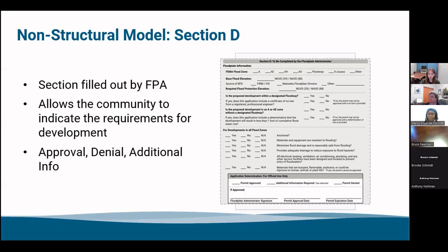There's also permit approved date and permit expiry date. This may be more for structural developments, but some developments would go on for a long time and that permit would have expired by now. Once that permit expires, they'll need to file another permit so that it can continue going through after its expiry date.